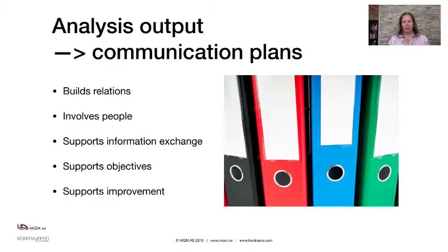If you have a more complex situation, developing a communication plan could be a good idea. A communication plan will give you a more controlled process towards each selected stakeholder, and it's a matter of cost and benefit, really. But when you have a communication plan, it's easier to build a relation, and when you have a good, open, existing relation with your stakeholder, you usually get a better result.